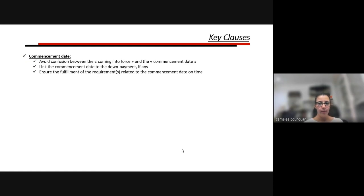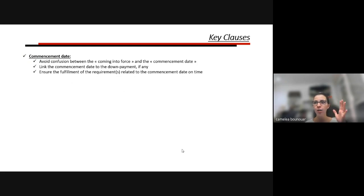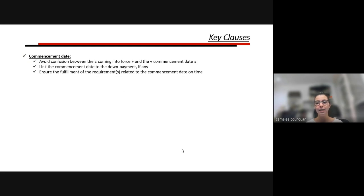Commencement date: sometimes people assume by default that the commencement date is the contract signature. But sometimes one contract document says it's the down payment, while an annexure says it's the command to force. How does the contract start? This date is the T-zero of the schedule — it must be crystal clear, defined in the schedule. If there's a discrepancy from the very start of the contract, there will be frustration from the very start.